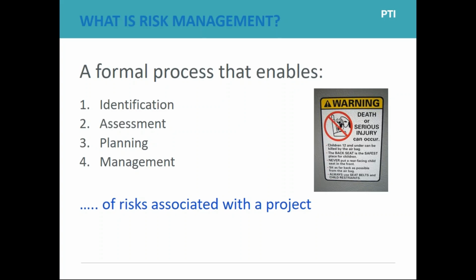And I don't mean daily, but certainly if you've identified the risks at the beginning of the study, if you're outsourcing a clinical trial, once recruitment is over, your risks may change. And once all countries are open, your risks may change. So it's a matter of being aware that what was a risk on day one may not be a risk 30 days, 60 days, 100 days later.